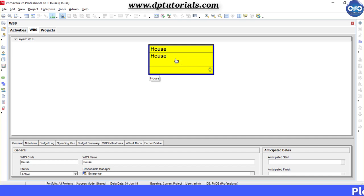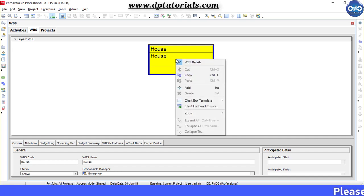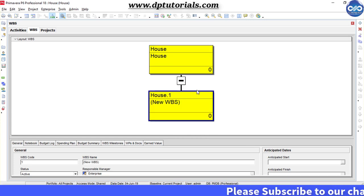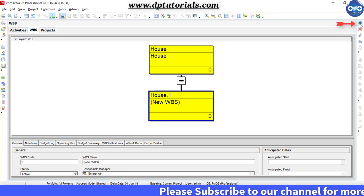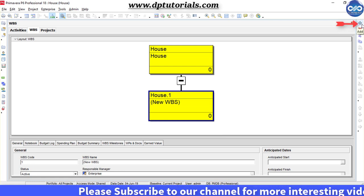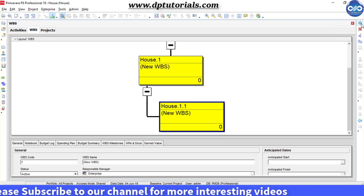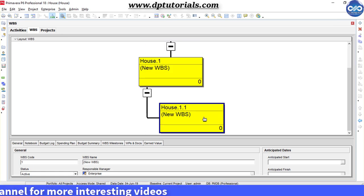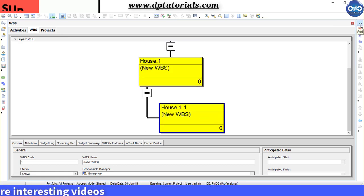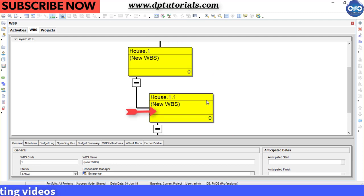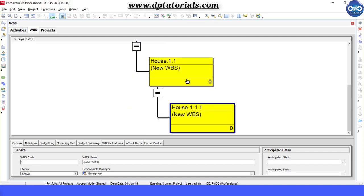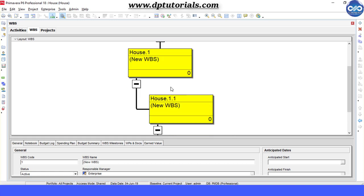Right click on the top level WBS and choose the add option from the menu, or click the plus button on the right side toolbar to insert WBS elements. You can notice that every time we insert a new WBS, it becomes a child of the currently selected WBS.